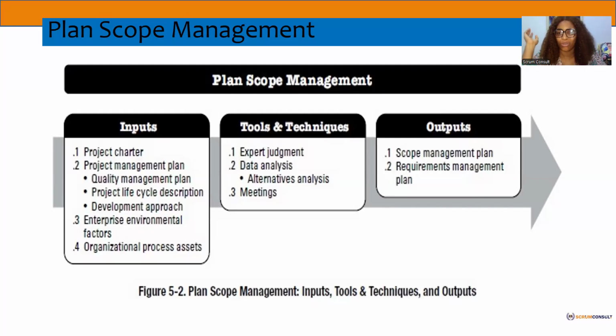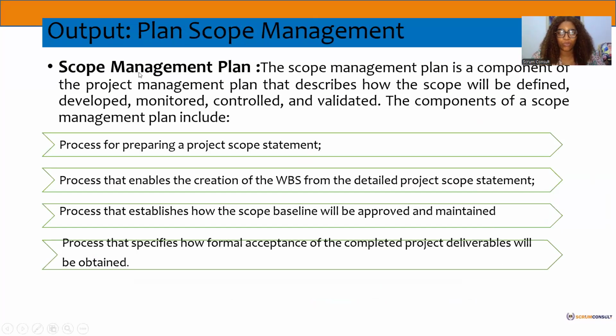Plans are basically just documents, nothing else. But you need to know how to bring them to life. You need the input combined with the tools and techniques to be able to get your needed output. So this is what we have in the scope plan. What the process for preparing the scope statement is going to be. The process that enables the creation of the work breakdown structure. Are we going to create it? What format are we going to use? The process that establishes how the scope baseline will be approved and maintained.